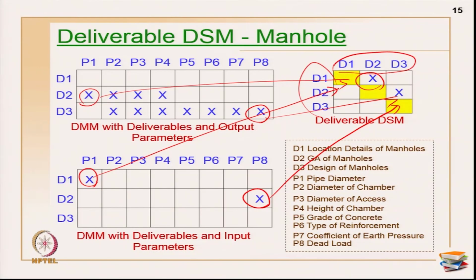So, the logic for formation, if you want to identify a complete DSM, is to go through decomposition. WBS will still hold good for you, and with the help of WBS you can identify all these levels. It can be level 1, level 2, whatever it is, drive assembly level, or you can go through team level, component level, or activity level. I have shown you several cases right now. So, you can stop at any level. WBS will help you to identify only this.